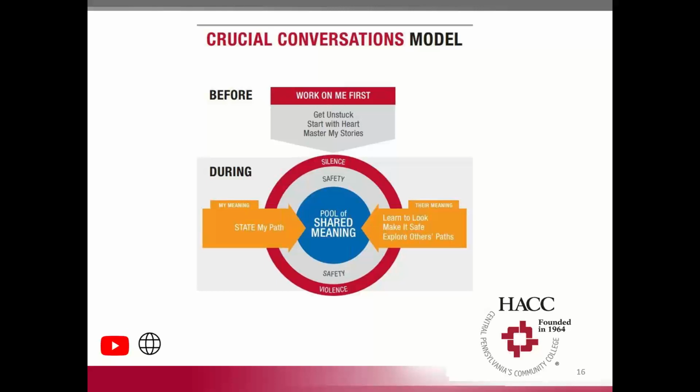I have young field staff that just want to hammer the QA or hammer the client's project manager on stuff. And I'll often say, hey, did you ever think about this? From their perspective, they're waiting on something from us, a submittal or an RFI, but they've got a process they have to do themselves that doesn't happen immediately. So while that conversation is happening, I hopefully don't have to break up an argument, but I make sure to ask, did you ever think of looking at it that way? During, you can't get dug into your foxhole and then just mow everybody down. You got to take a look at that during.